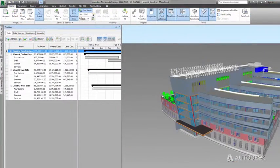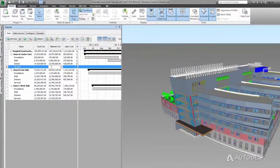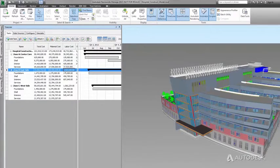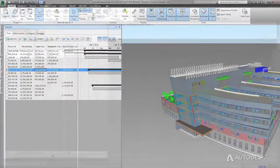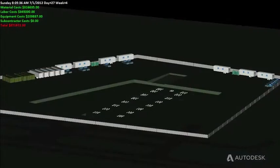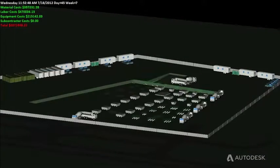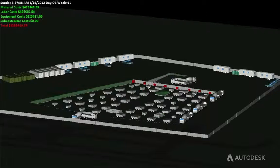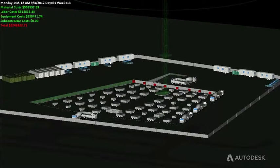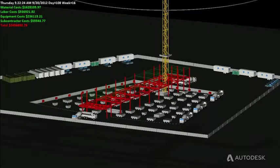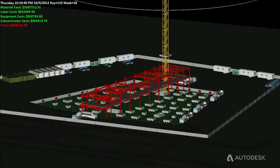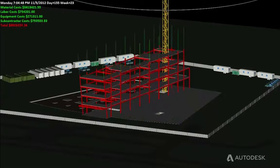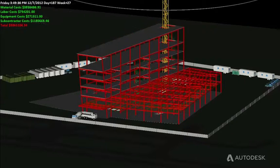Additionally, Navisworks offers analysis capabilities that enable you to attach costs to a task, creating a cost-loaded schedule. Easily simulate how your project's costs are accrued over the entire project duration, as well as take a snapshot of expected costs at any point in the project schedule.